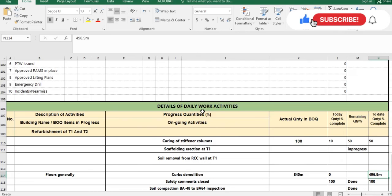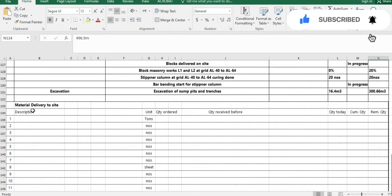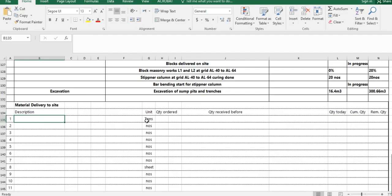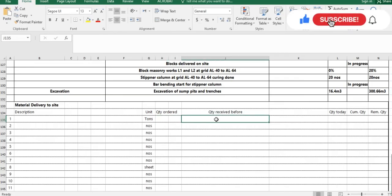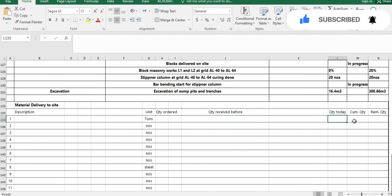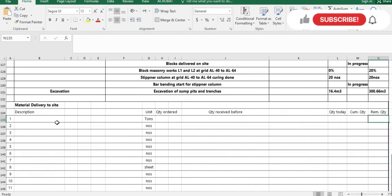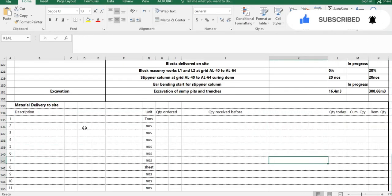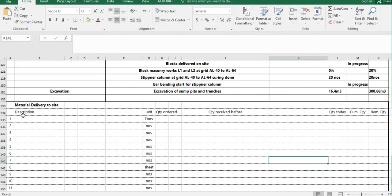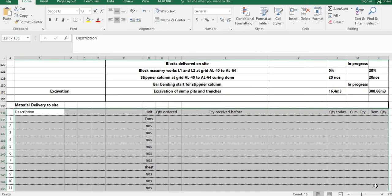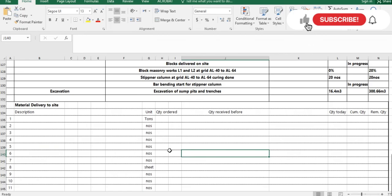After the daily activity details, there is the material delivered to site section. Here you write the description of the material, quantity ordered, quantity received before, total quantity received to date, and remaining quantity. Fill this with all material received at site. The data comes from the store department, who provide delivery notes, FIO numbers, and material requests.